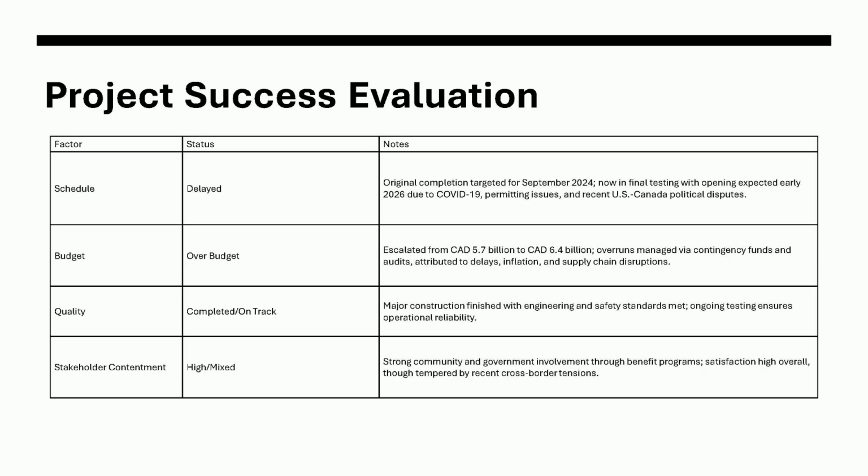The opening is expected in early 2026, impacted by COVID-19 permitting issues and recent US-Canada political disputes like the February 2026 threats from the US side, which were quickly addressed. On budget, it's over the initial 5.7 billion Canadian dollars, now at about 6.4 billion due to those same delays, inflation, and supply chain disruptions. However, these overruns were managed effectively through contingency funds and routine audits, keeping things under control.